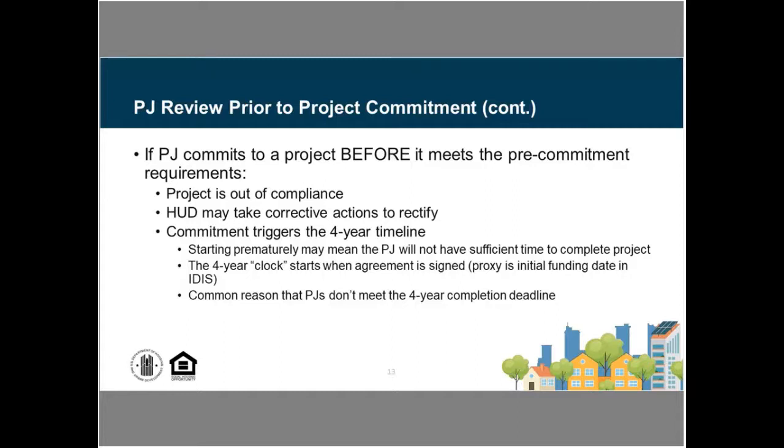So if the PJ were to prematurely essentially commit funds to that project, that really puts them not only in compliance risk on the commitment end of things, but it puts them at risk of having a project that's really not ready to proceed and might struggle potentially with this 4-year deadline.